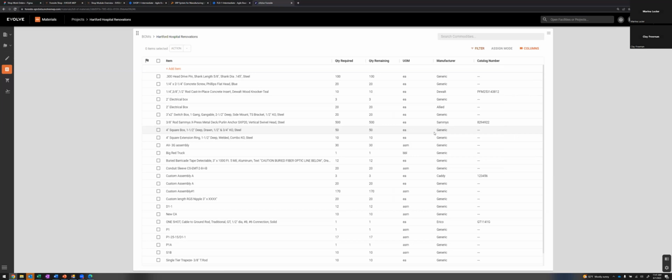And so we really think that this BOM is going to become the key management tool for project teams. The BOM is going to be the single source of truth that reflects the scope for the entire project. It can all be filtered by location and work phase. And then the items are sent either to a work request or to a requisition, and the system will do the accounting to see if there's anything that you need for that location and that work phase that you haven't assigned either to a work request or to a requisition.